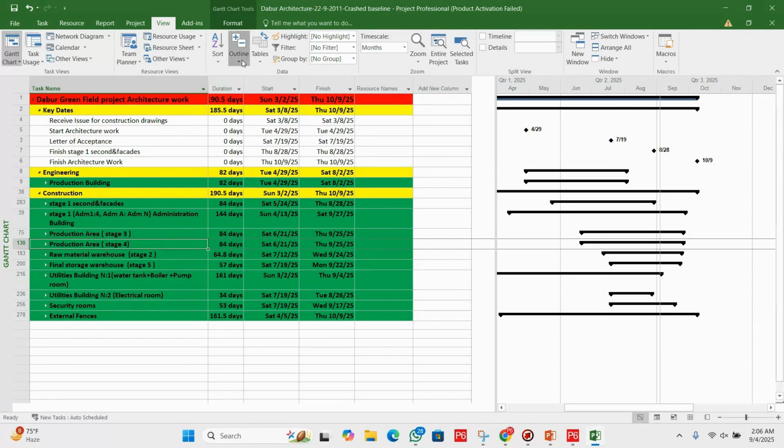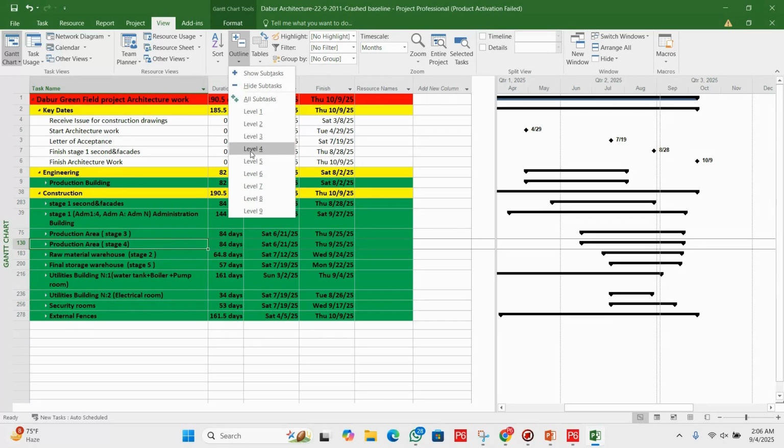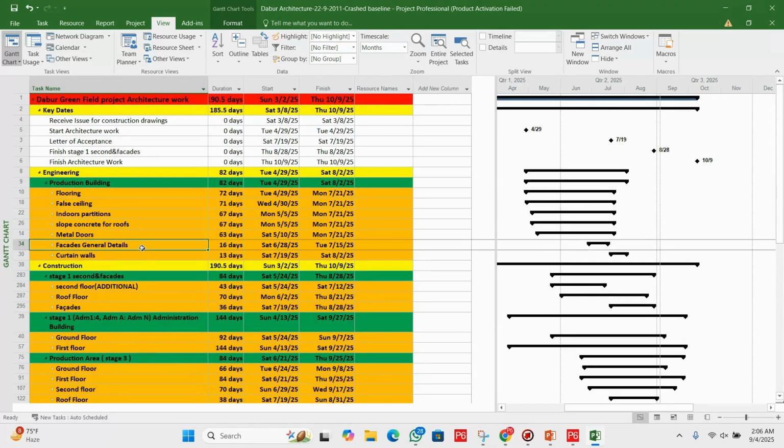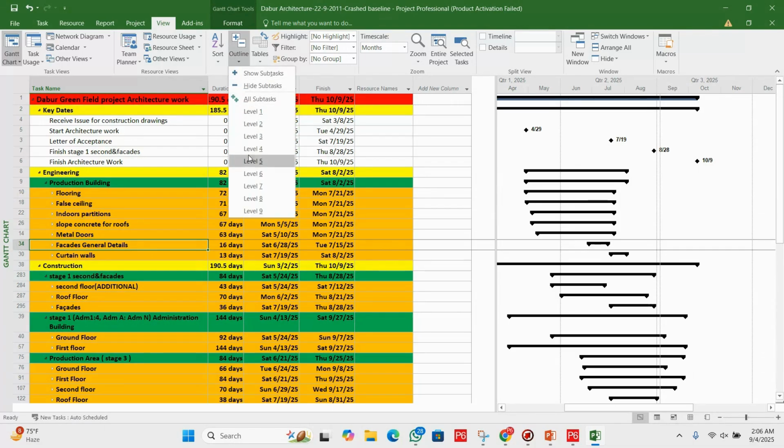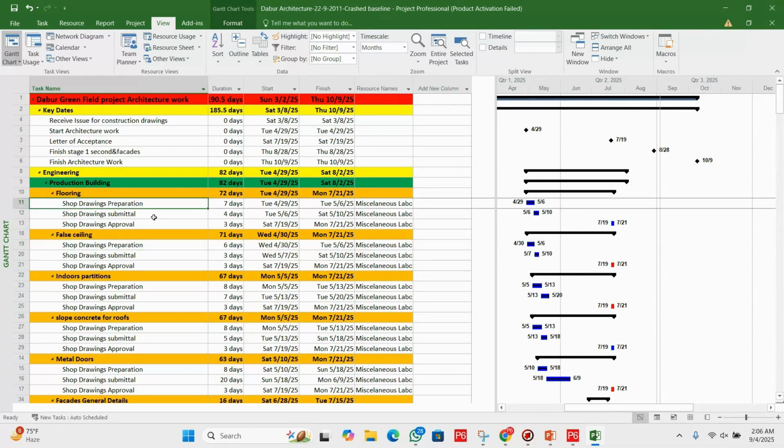Then level 4: under level 4 we have further sub levels, you can see here. And after this we have level 5 as well. At level 5 we have only activities, the tasks which we cannot break down into further tasks or activities. Okay, so like this, we can check the scheduling levels and WBS levels for Primavera P6 and MS Project.